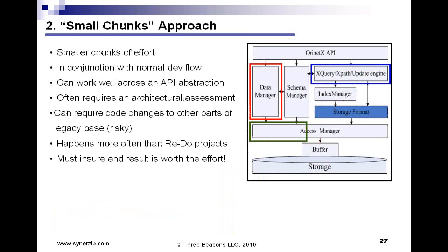Okay? Number 2 technique, use a small chunks approach. Now, this is a good approach when management will just not buy off on the cost and time of a redo project. You can say, well, okay, as we're developing these new features, let's take some time out and do a small chunks approach. Maybe this data manager portion of the system has always been troublesome. Let's see if we can't write a makeup story card on that, and let's spend some time redoing that area under a rigorous quality plan and using agile techniques.